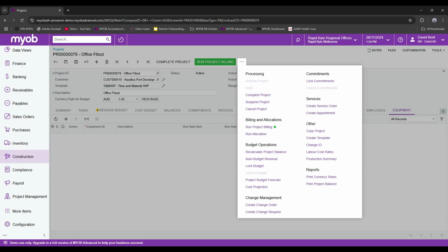So let's say you put in a budget and you say, with our process, once the budget is in place, that's it. That's locked in for the life of the project. We do not change it come hell or high water, whatever you want to say for that. So you can go in there and lock your budget. If you do budget forecasts, you can do that from here as well, and you can also review those forecasts from here. There's a lot of functionality. You just have to know what you want, and the system can be configured for it.